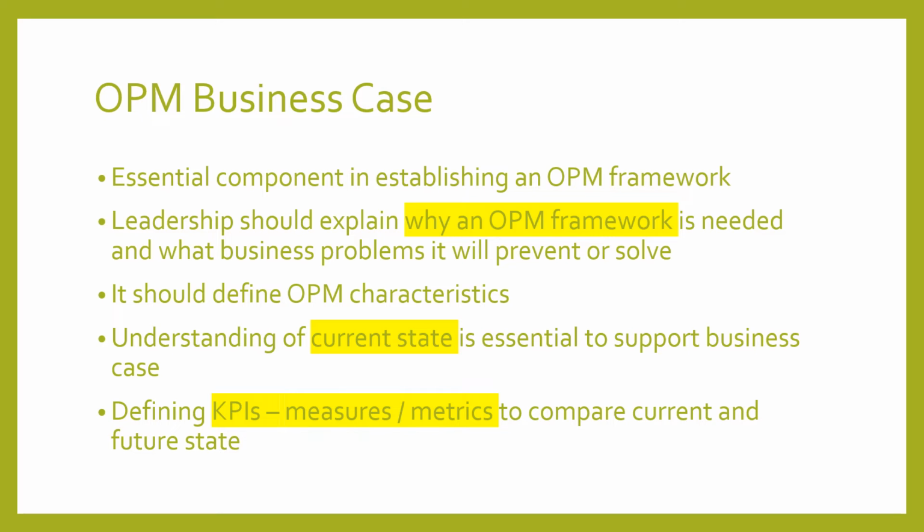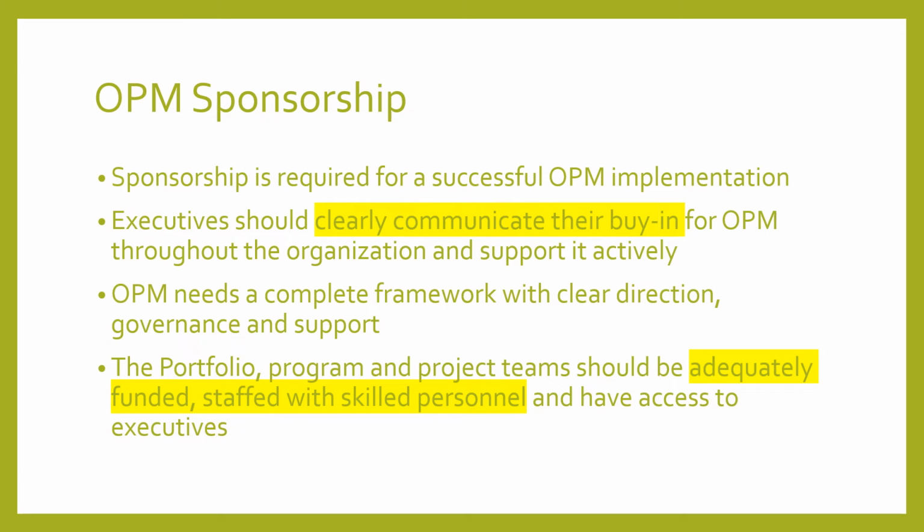The OPM business case should define OPM characteristics, and how well it is going to integrate with the organizational enablers, processes, tools, and everything. Understanding of the current state is essential to support the business case, along with defining the KPIs, measures, and metrics to compare the current and future state. So all these things are needed for the OPM business case, which is one of the foundations of OPM.